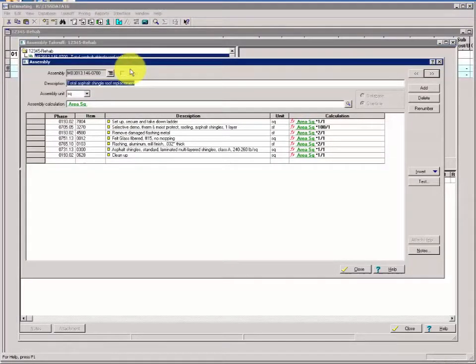Now we've decided to keep the demolition portions and the re-shingle portions of the assembly, but we know that on our building, specifically in our park, we want to plan for costs to do some damaged sheathing removal and replace, possibly some of the framing members. The rafters, the hips and valleys could be damaged, and we want to include some costs to replace some framing members. So we have to both remove and replace those Division 6 type items.